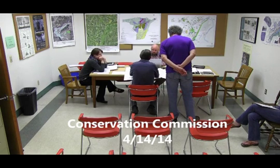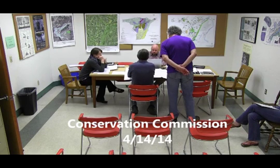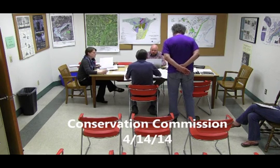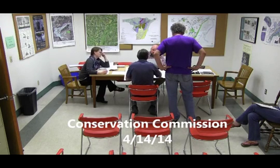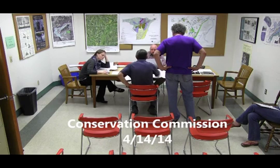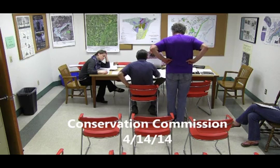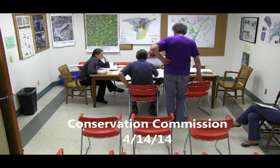I can't really show it on here. It's shown on the cross section. But just a rectangular, flat area up there, so that someone coming out, before they pull out into the street, has a paved surface for traction. Otherwise, you spin the wheels and you're trying to get ahead of traffic. Ron has trouble on the opposite side of the road, and we'll create a little extra pavement there for him for traction to get out, because he comes out with his hay wagons. The floodplain on the north side of the road is much lower, 2 feet lower than on the south side, so we can do some work on his sloped driveway without getting into the floodplain issues like on the south side.